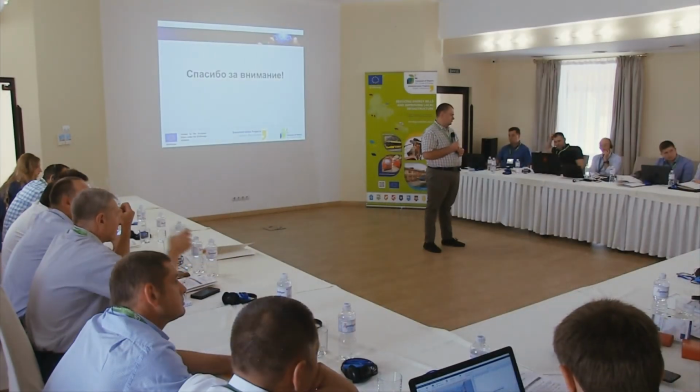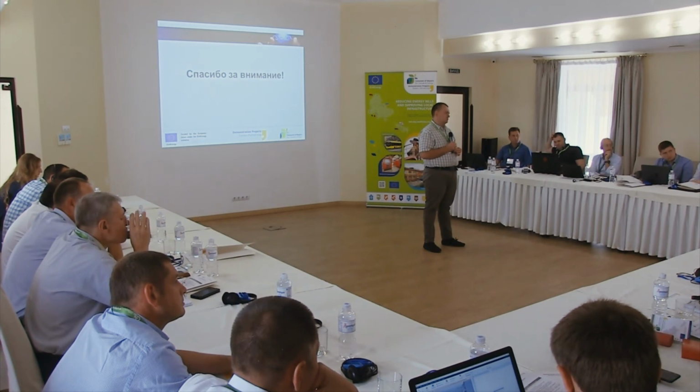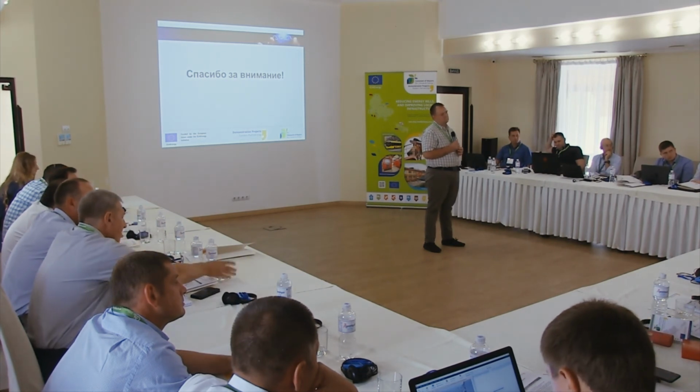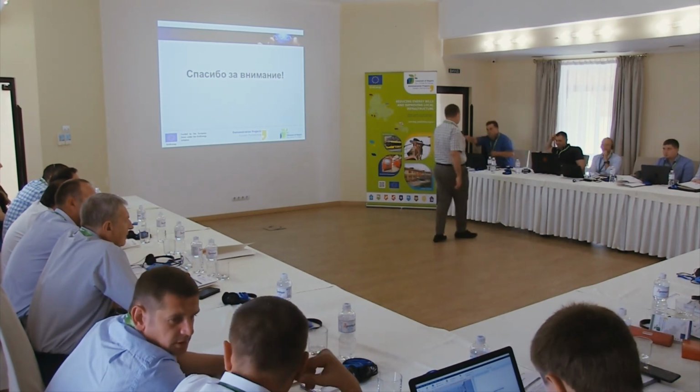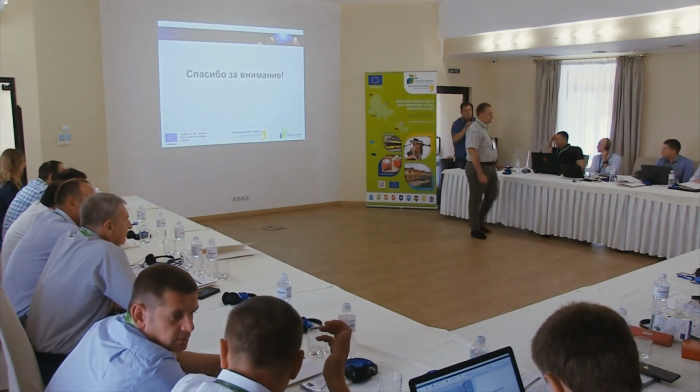It happens. Therefore, I would say that design and estimate documents, or design and specification document, no matter what you call it, may sometimes give a boost in terms of rising costs. And therefore, I'm addressing my colleagues. You need to show that your project is tax-free and customs duty-free when you're developing design and estimate documentation, because then it already yields 30%.